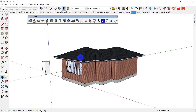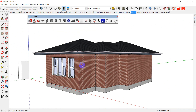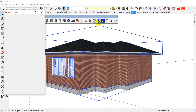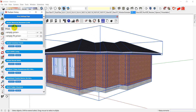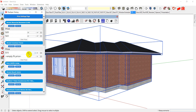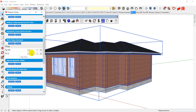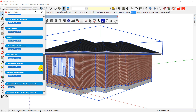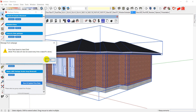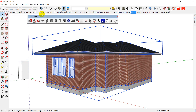More importantly for a builder: what is it going to cost? I can select the whole model and put prices in by clicking on the dollar sign — you only have to do this once. For my roof it might be $20 a square meter, fit price $22 a square meter, fascia $15, gutter $5 — just as a rough example. These prices are saved, so next time Plus Specs opens, your prices are already in there. Save and update, and it remembers what you put in last time.